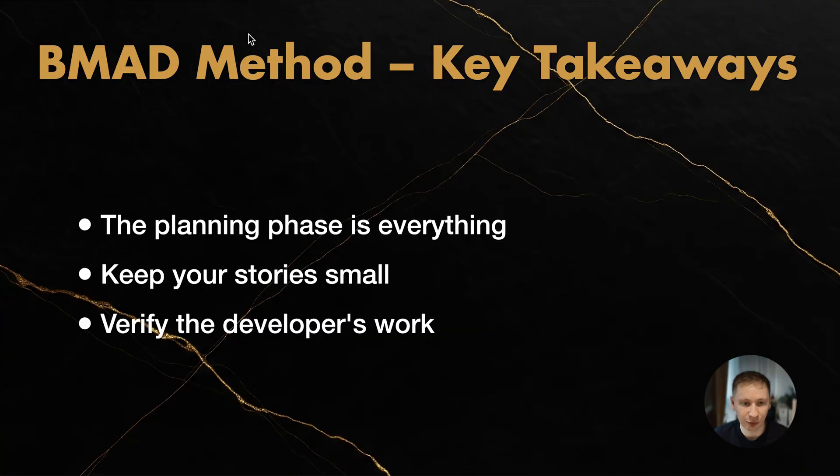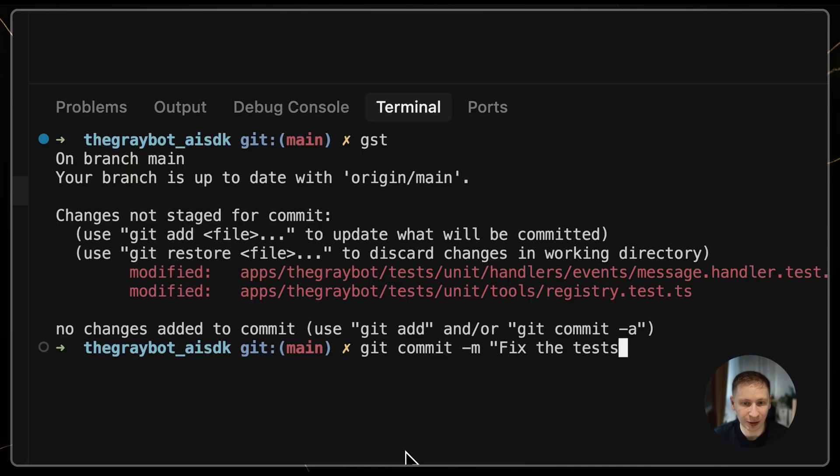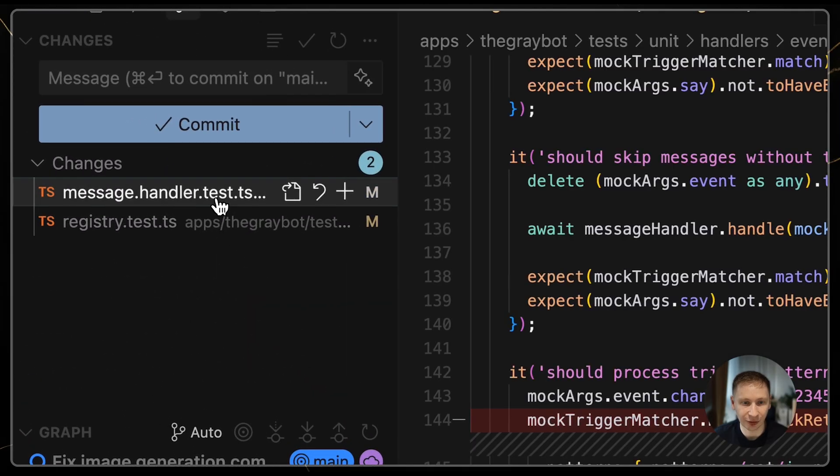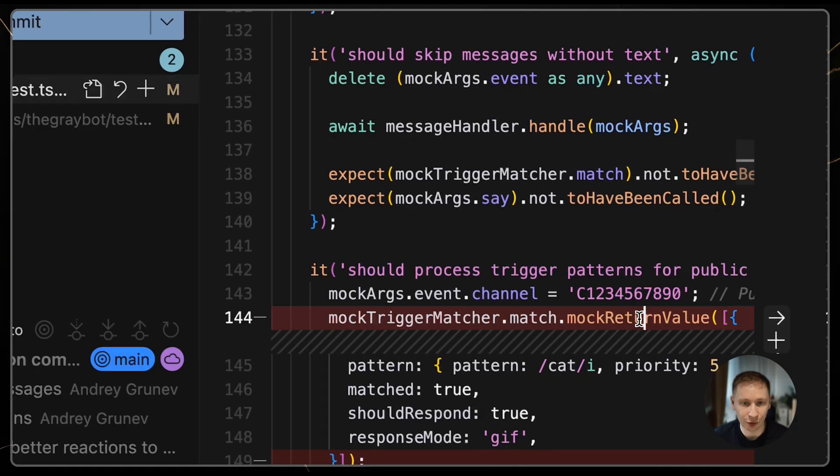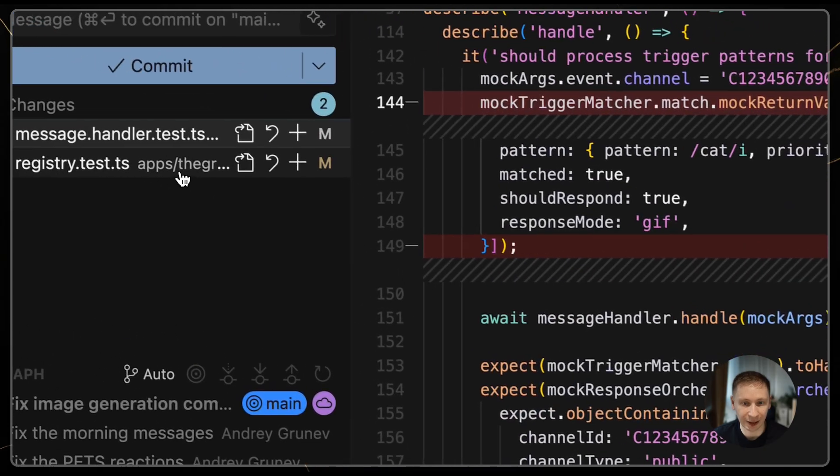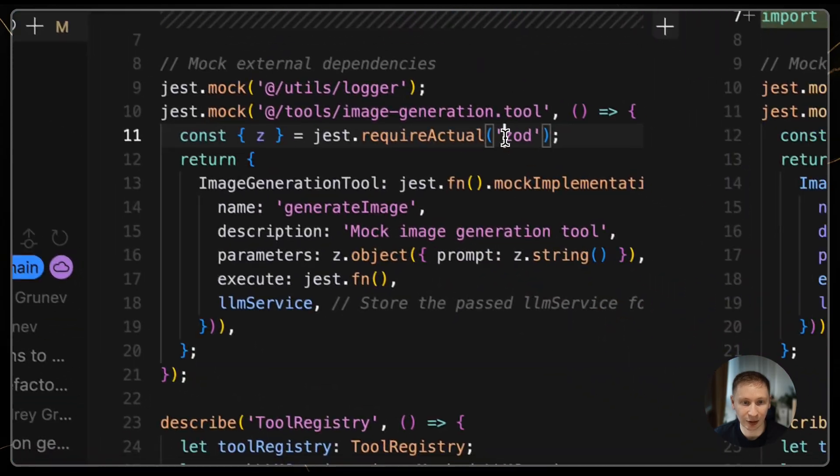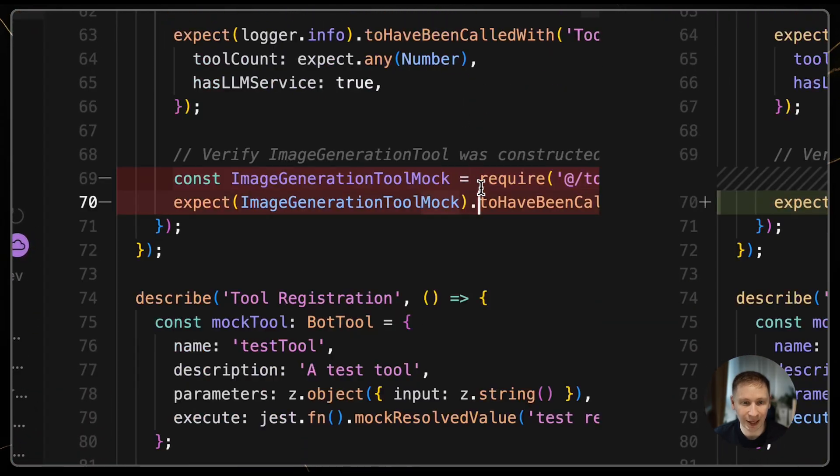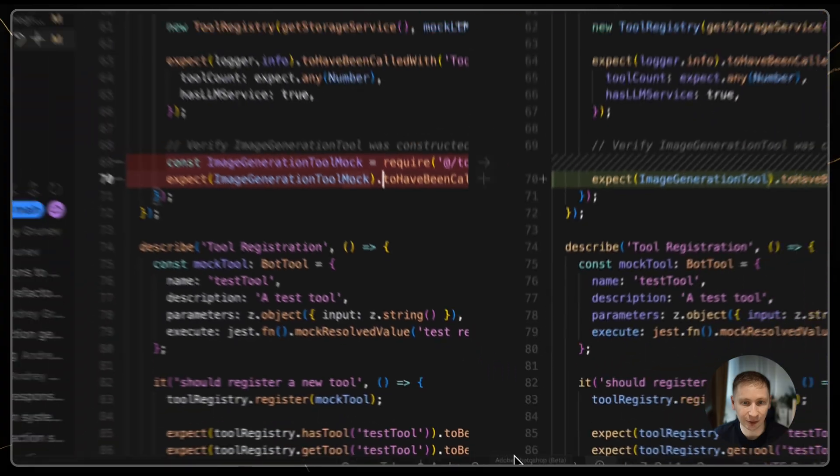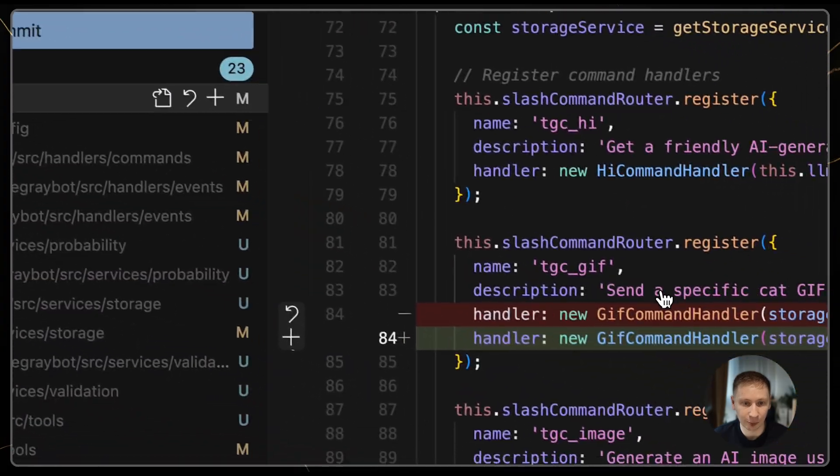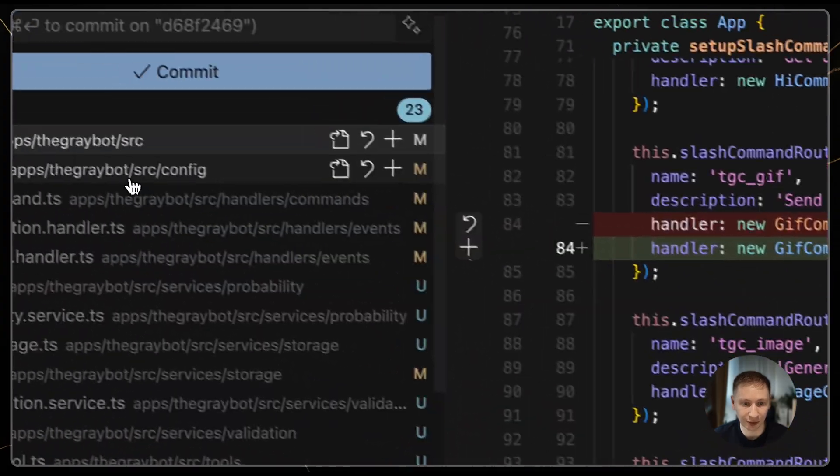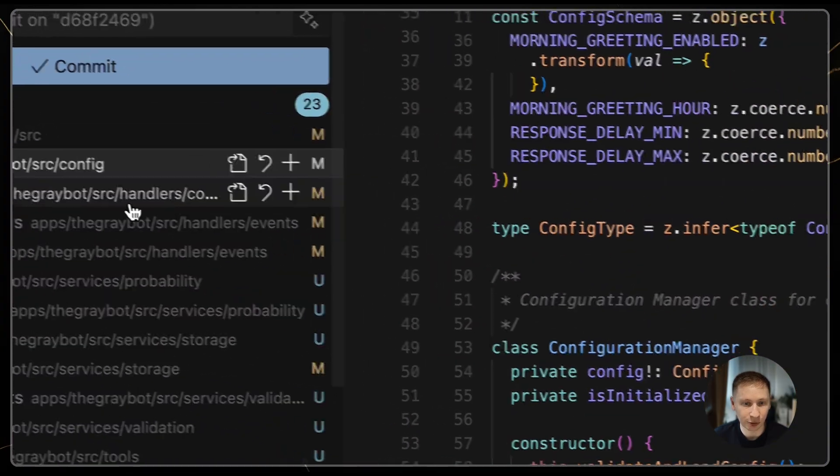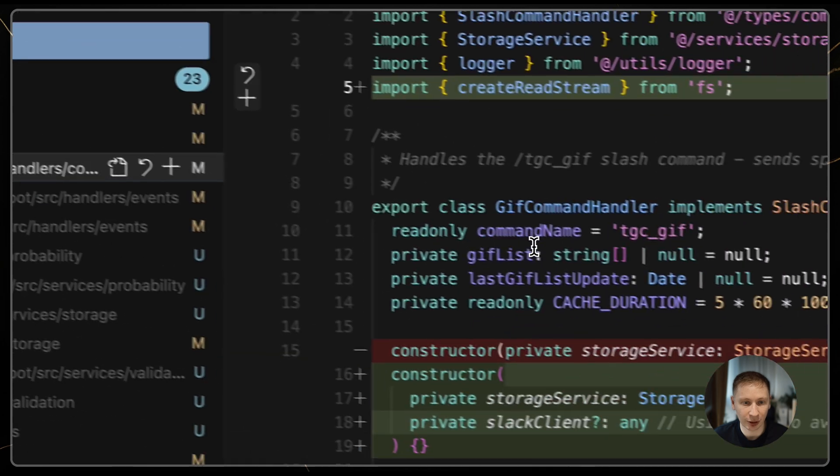Number three: Verify the developer's work. Commit as often as you can. This lets you easily see the latest set of changes in a diff before they get mixed in with other work. After the developer agent says it's finished, review the code yourself, before you test it or send it to QA.